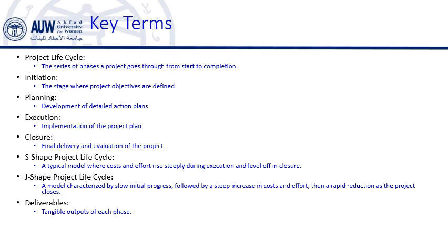Closure is the final phase of the project life cycle. It involves completing and delivering the project deliverables, evaluating the project's performance, and formally closing out the project. During closure, the team conducts a review to identify lessons learned and document best practices. In the closure phase, for example, of a marketing campaign, the team should analyze the campaign's success, gather feedback, and compile reports for future reference.